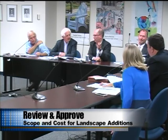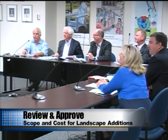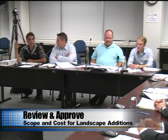Any other discussion? Any other discussion? I have just one quick thing regarding the bioswale. Something has to be done in terms of stabilizing the soil, topsoil, hydro seeding. That is not currently in the GMP, so there is some risk exposure there.